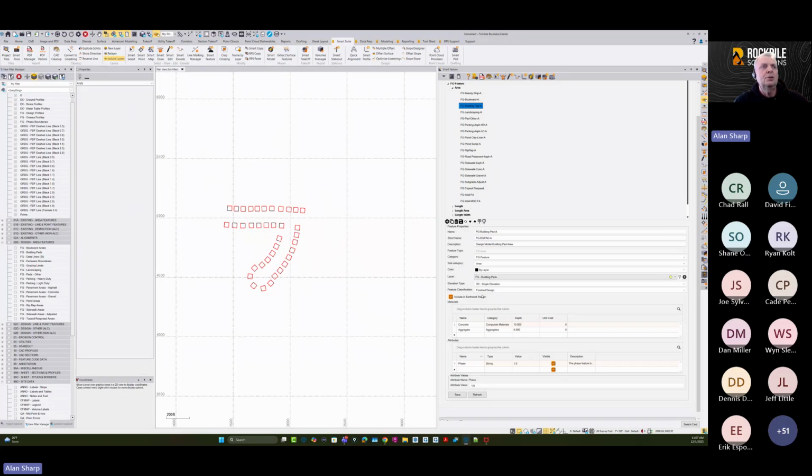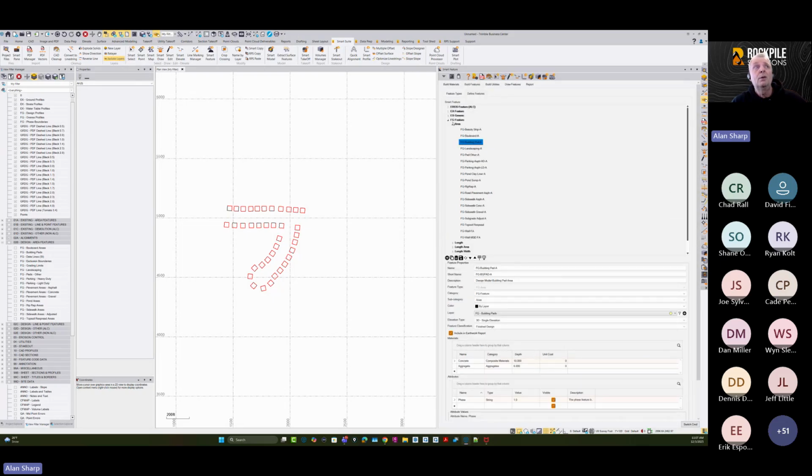So there's a set of tools in the drawing function that allows you to add the attributes directly to the features as you're creating them. And things like exaggeration would be another attribute. So if you're doing cross-section takeoff and the cross-sections are exaggerated 2 to 1 or 3 to 1 or 10 to 1 or something like that, then you want to put an exaggeration factor in there. And then when we do the report, we use the exaggeration factor to reduce the quantities of the area that is measured by TBC. We just adjust it by 10% or 50%, depending on the exaggeration factor that you've got in the model. So you build your feature libraries up, and once you've built the feature library, there's not much more to it. So I'm not going to go off and build this again.